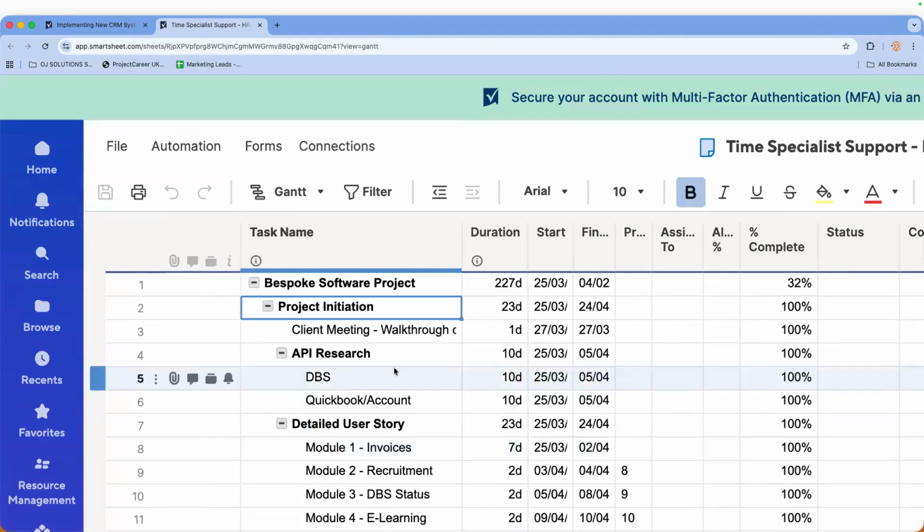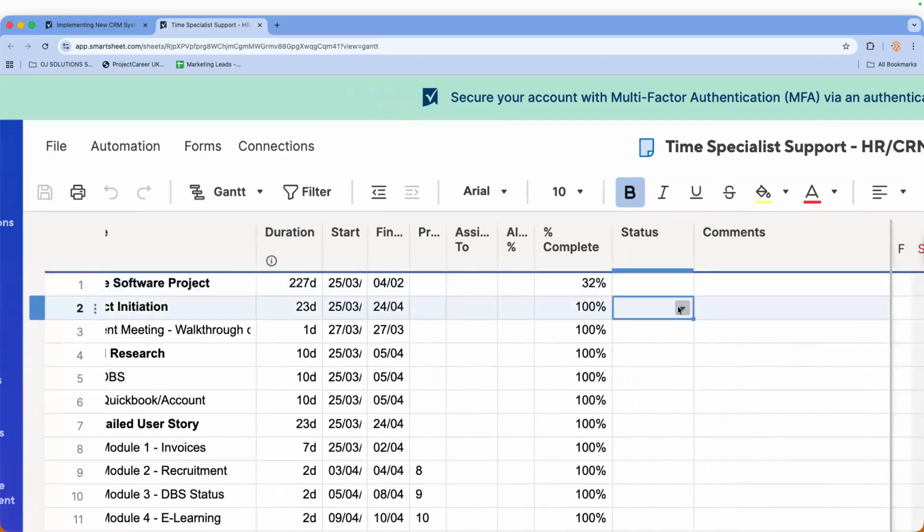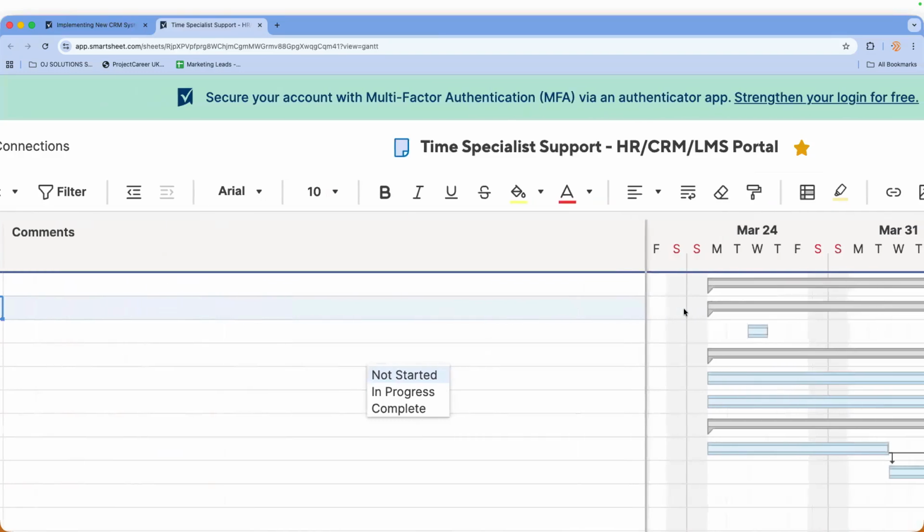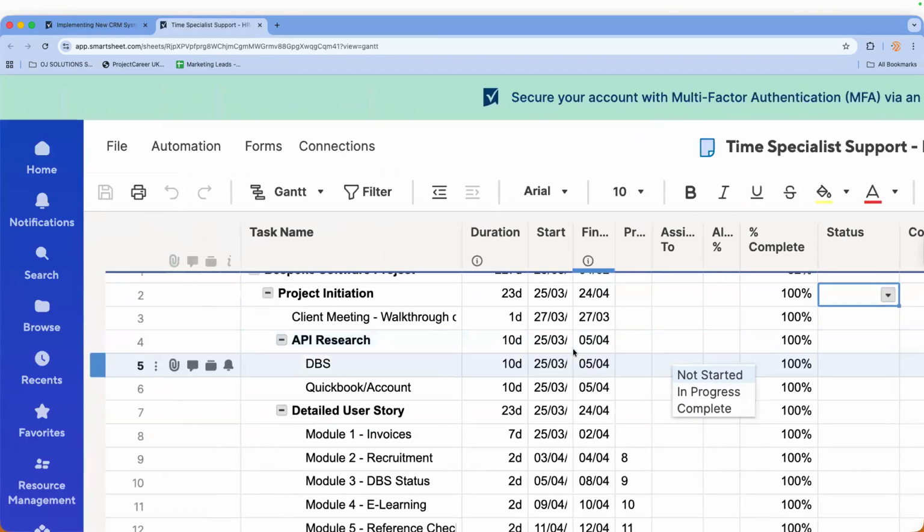Technically, you should be completing all these areas, right? Percentage complete. What is the status? If you look at the status, there are 3: not started, in progress, complete. Because with this, when you get really good with it, you can use it to actually generate your reports. You can use it to tell you these are the activities you started, these are the ones you finished, these are the ones that have been classed as having a blocker, and so on and so on. Yeah?